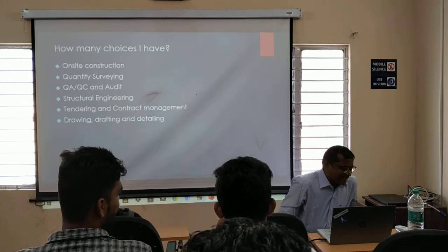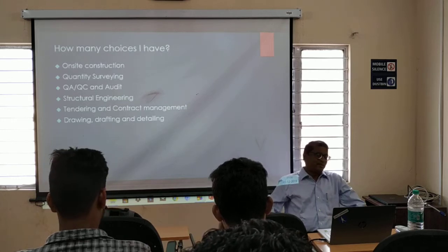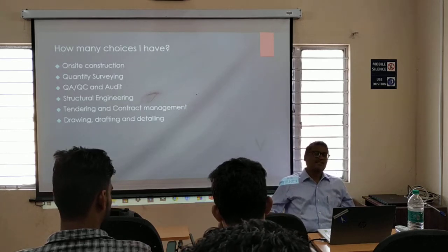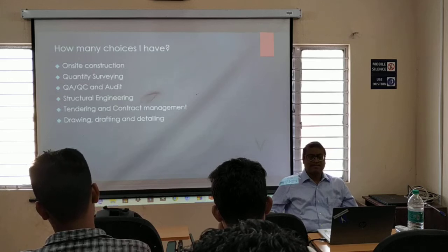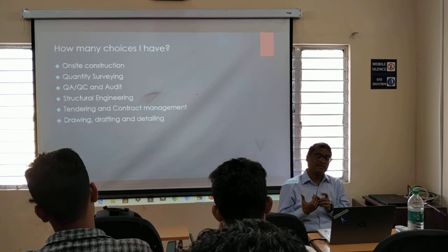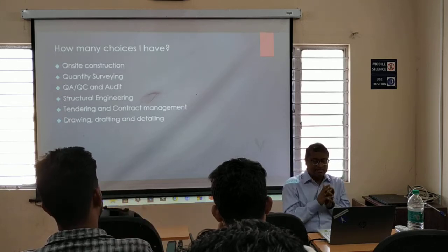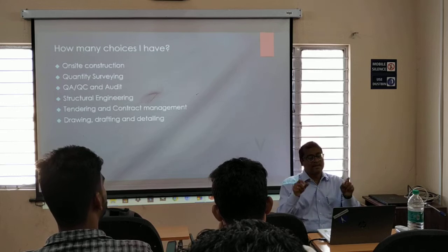Okay. So a shop drawing is called a shop drawing because you should be able to generate the shopping list out of it. Shopping list means procurement order. You have to procure the material from the market. The contractor should be able to procure the material. The GFC will give only the intent of the designer.